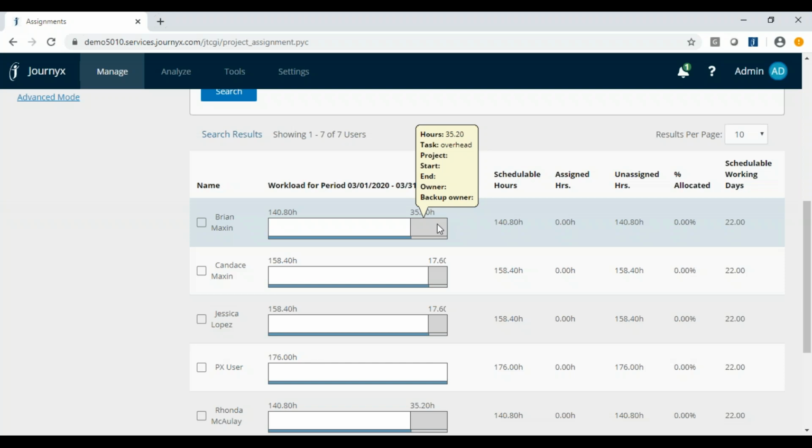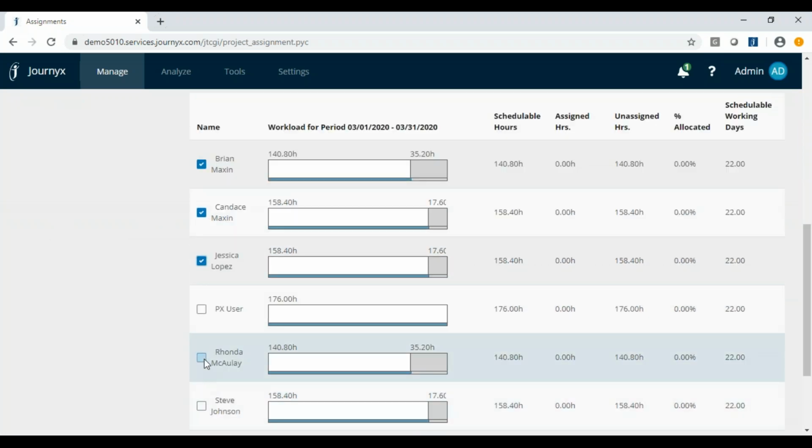So for the % of time I work on meetings or overhead or anything that really isn't project related, by resource, you can set what % of their week or their time is not available to work on projects, and it's going to display in this gray area. So for these 200 hours for project 4 over the month of March, let's say that I wanted to go ahead and pick these 4 resources to work on that project.